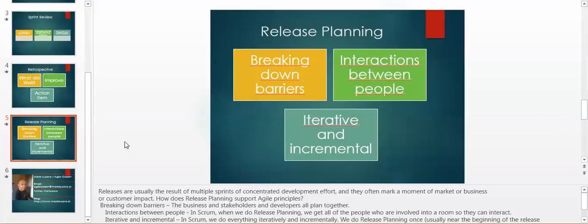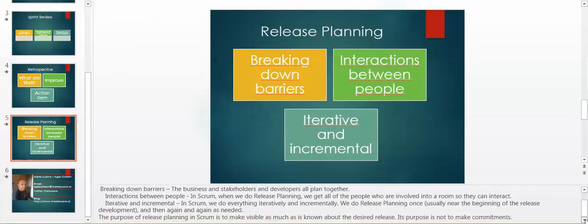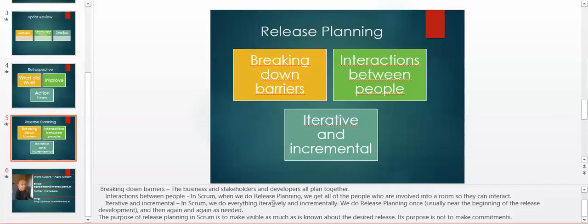In Scrum, we do everything iteratively and incrementally. We do release planning once, usually near the beginning of the release development, and then again and again as needed. The purpose of release planning in Scrum is to make visible as much as is known about the desired release. Its purpose is not to make commitments, but to demonstrate and deliver software.